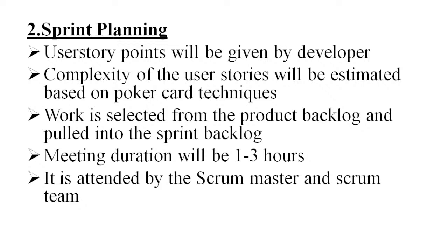Otherwise, the maximum point user story will be split out into two types. The user story points will be given by the developer. The complexity of the user stories will be estimated with the poker card technique. Poker card technique means depending on the Fibonacci series 1, 3, 5, 8, 13, we give the points to that particular user story.